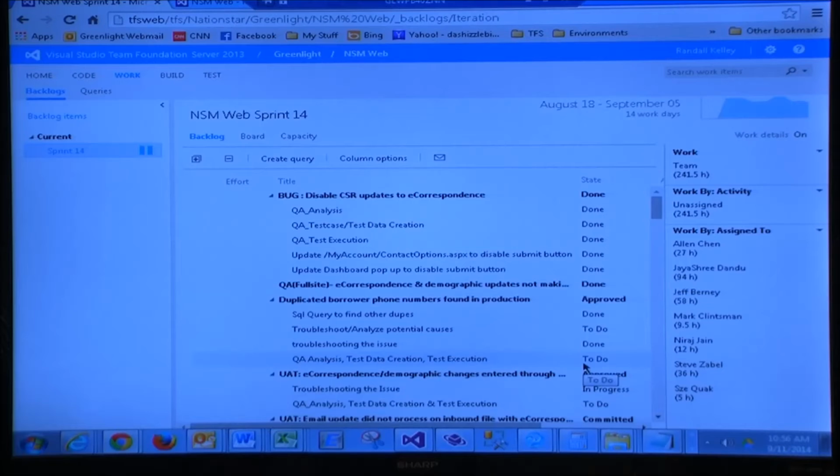Yep, the idea is when you wrap into the next sprint, work with the Scrum Master, and it's relatively quote-unquote simple to migrate work items from one TFS to the other. You just export it to Excel and then reload it via Excel to the new project. So that's quote-unquote an easy process, it's just all the other nuances of that.